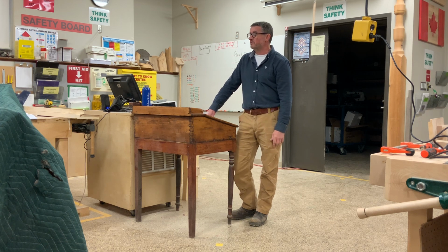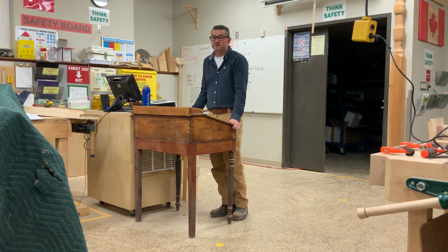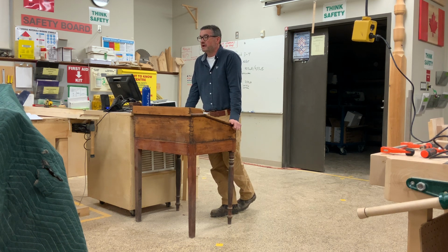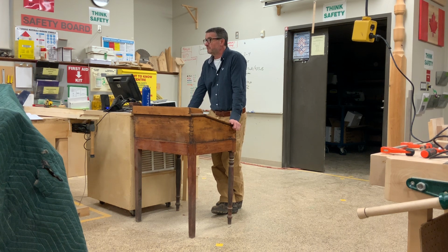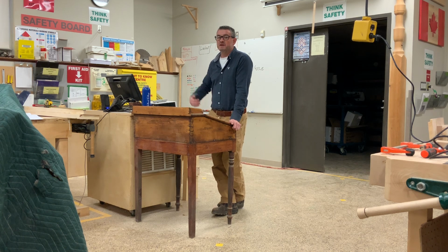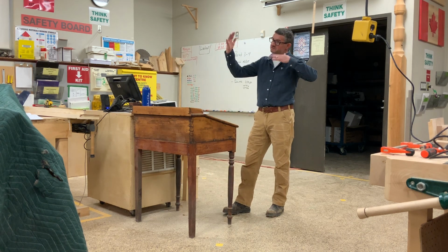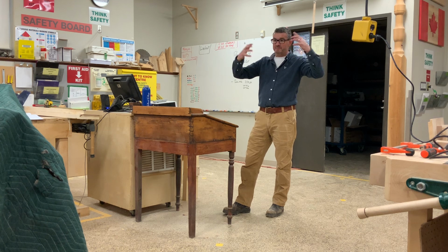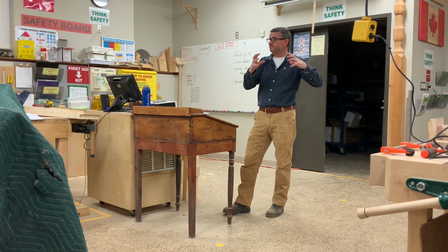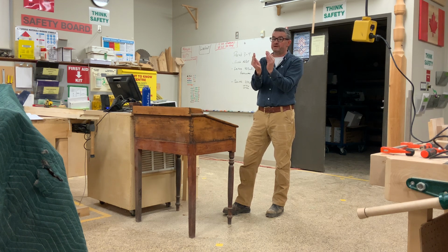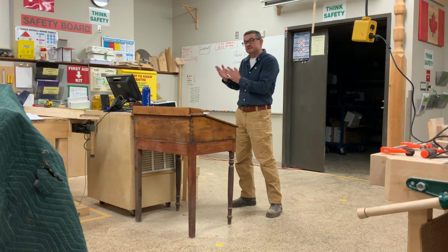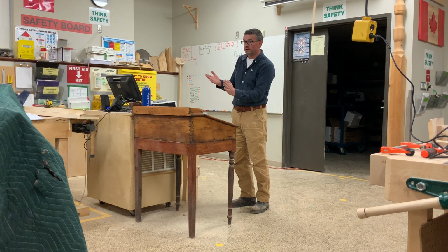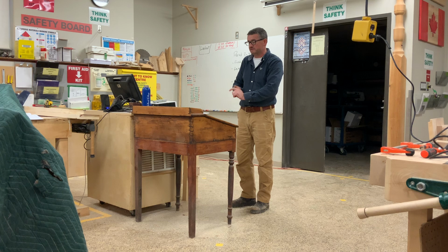Next semester, you're going to work with what's called project management. You're going to make Gantt charts, and you're going to work with this complexity. And we're going to use the timber frame project as the real life project that you're going to work on. And you'll have a critical path for all the pieces, and all 18 of you are going to make different pieces. And the folks that take longer are going to slow the whole process up, because we've estimated it's going to take 3 days to make this piece. Well, that person may take 6 days, and the whole Gantt chart will get backed up because we're not reaching our targets, that critical path.